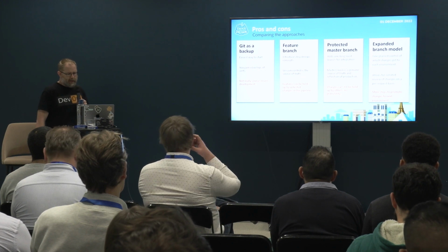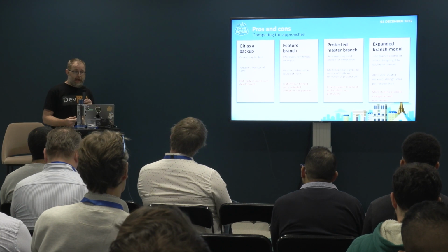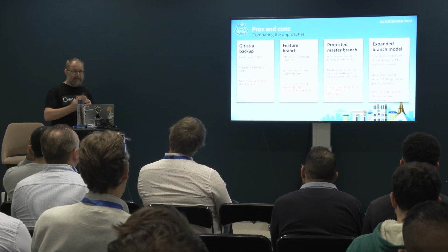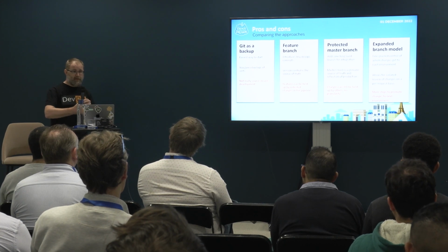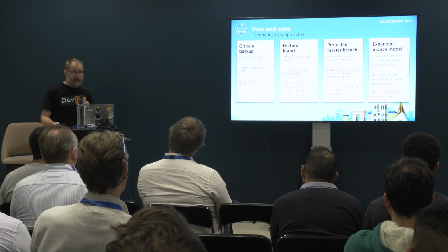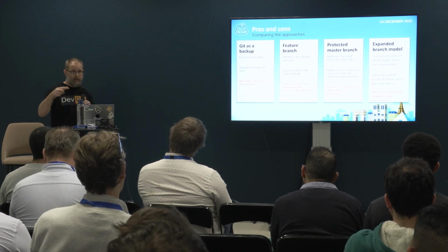And what that does is it makes each feature branch much more discrete, and then each environment has its own branch, so that you can have that separation between what piece of work or what unit of work is where, anywhere in that process. And it removes that dependency because each ticket can move through at its own pace.